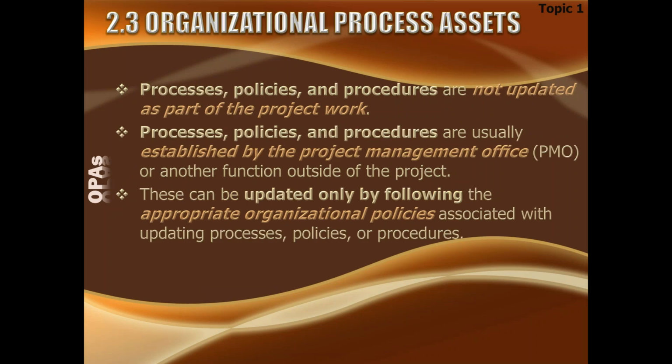Processes, policies, and procedures are not updated as part of the project work. It is not the responsibility of the project to update the processes, policies, procedures, rules, regulations, templates. This is not their job. So processes, policies, and procedures are usually established by the PMO. If you have a PMO, this is the primary responsibility of the PMO to develop these policies, procedures, and processes for project management, or another function outside of the project. If a PMO does not exist, somebody else may be responsible for taking care of this issue.